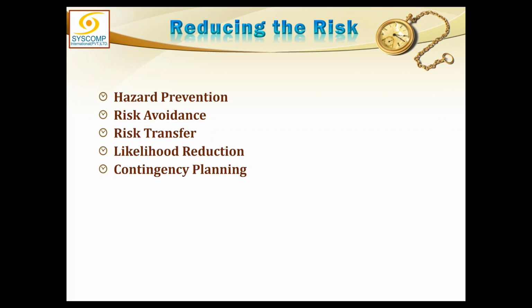So you see, by treating any one of these items, either the probability or the amount at stake, I can reduce the overall impact of the risk. I can mitigate that, and if I can do this to both of these items, then it will be drastically reduced. As you have seen, it was reduced to just 1,000 rupees. So this is your risk mitigation.